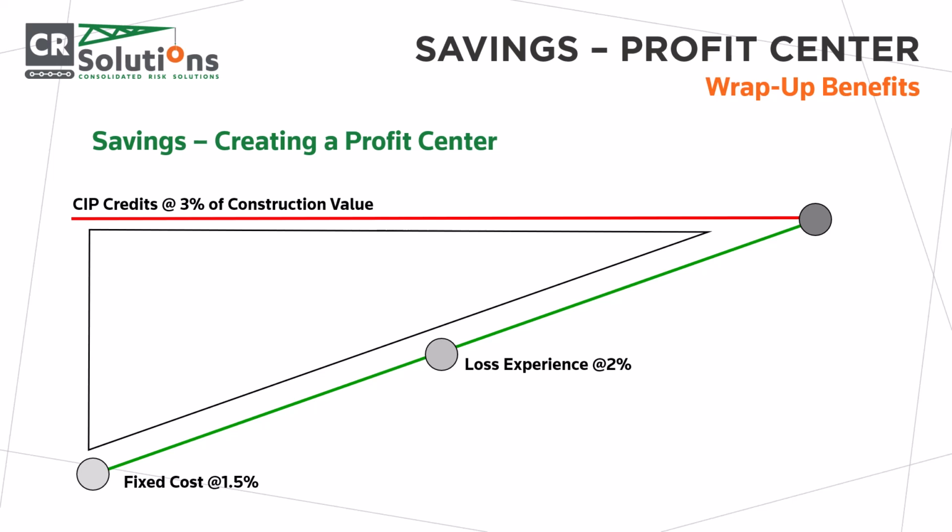Each time a claim occurs, the sponsor pays, and each time the sponsor pays, they creep further and further up the green line. As more claims are paid and the gray dot moves up the green line, the amount of profit available to the sponsor decreases. Thus, the more variance between the contractor credits and the fixed costs, the more dollars available to pay claims. In turn, the less money spent on claims means the more money kept as profit.